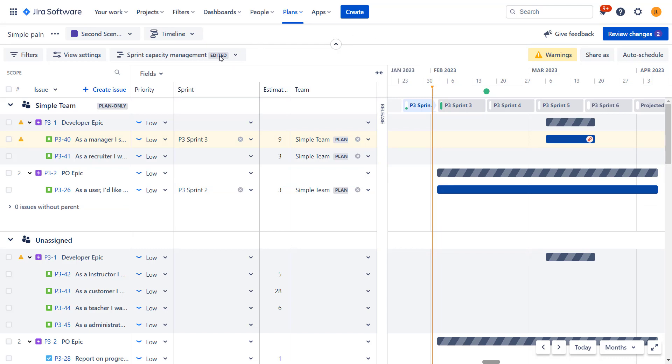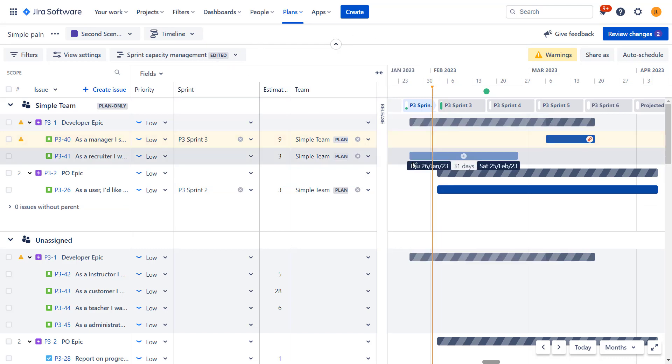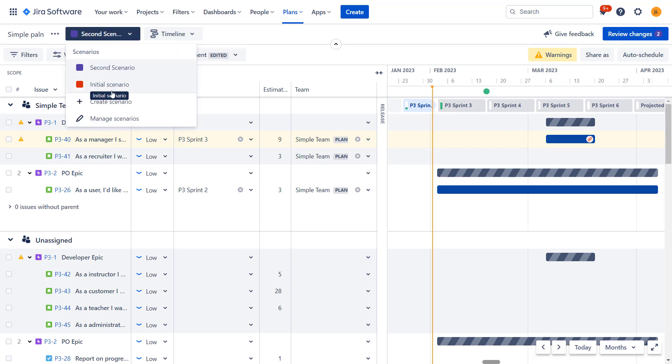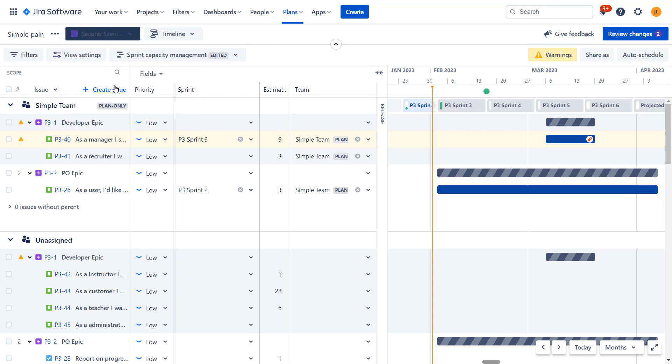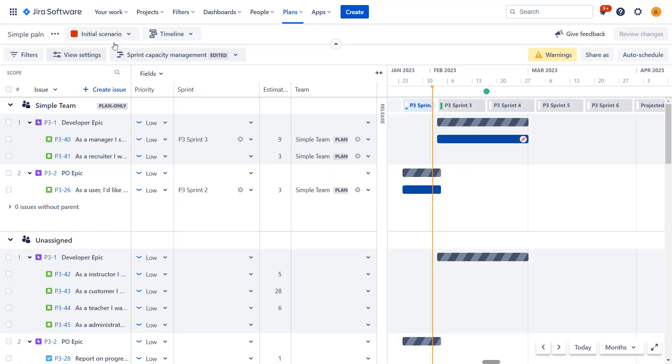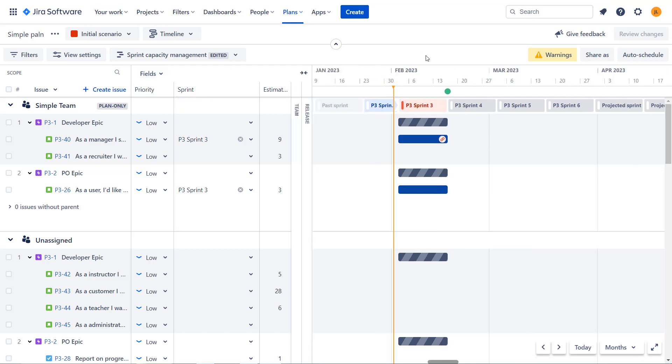So in my view, this scenarios is not something that you should use all the time. So you shouldn't have like five scenarios where you're doing different things all the time. Because in that case, one scenario will be overwriting changes done in the other. So I don't think that's the best approach, but at key moments where you need to update the scenario and you are not really sure which way to go is better, this feature is actually really useful. So you can just check how the changes will impact your plan and then decide on one or the other. You can remove the one that was not needed and just keep on working on the one that you approved.